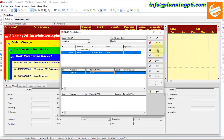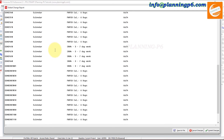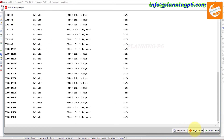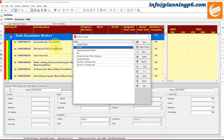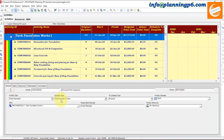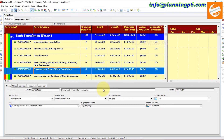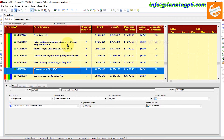This will change the calendar for the entire project. The log shows the old value was '6 days' and the new value is the updated calendar. After reviewing the log file, commit the changes. Once committed, if you close and check the Activities view, you can see that the calendar has been changed for all activities.